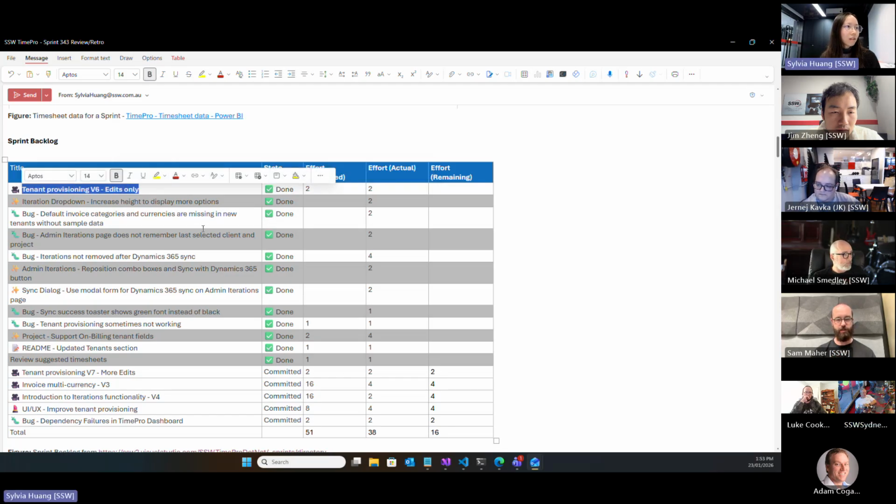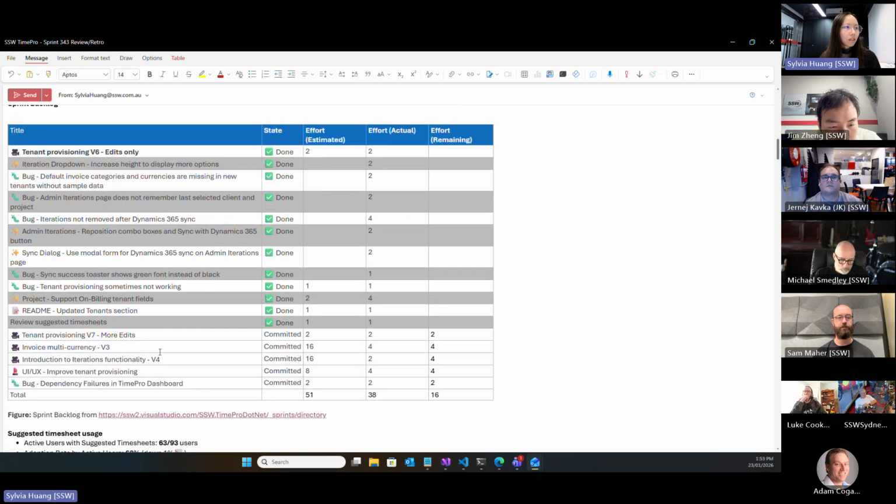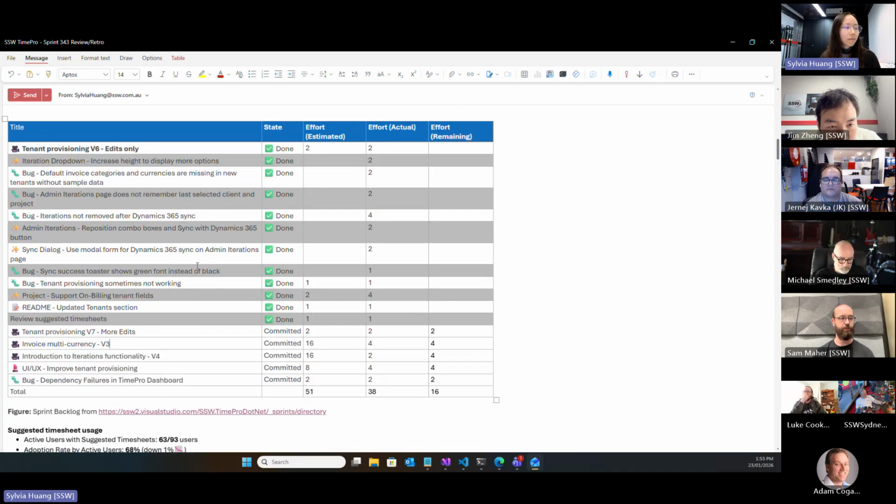Okay, so these ones are more like a prereq to the video task. So I won't say any of them are super important. Maybe like this, as these are done, but these massive ones still have remaining work to do. So we have an estimated effort of 51. That's because when we start the planning, we start with the 16, 16, and 8 in last planning, and then we break them down into smaller PBIs.